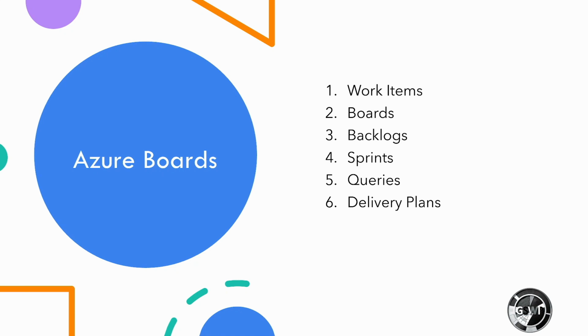Delivery plans. Management teams can view deliverables and track dependencies across multiple teams in a calendar view. Delivery plans support tasks such as viewing up to 12 teams' backlogs, custom portfolio backlogs and epics, and work that spans several iterations, that is, sprints. Users can add backlog items to plan, view roll-up progress of the features and the epics, and dependencies between work items.